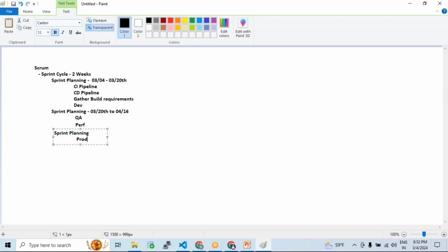The moment the code is ready, it will not get deployed everywhere just like that. It is properly planned in which sprint it has to go to dev, when it has to go to QA or perf, and when it has to go to production. Accordingly, we'll be working on these things. This is called a sprint planning, and you'll be involved in it. The manager will decide what tasks we need to deliver to accomplish the bigger goal they have to complete within a quarter, or 3 months. Let's say the 3 months timeline is to build and deploy all of the 50 services.